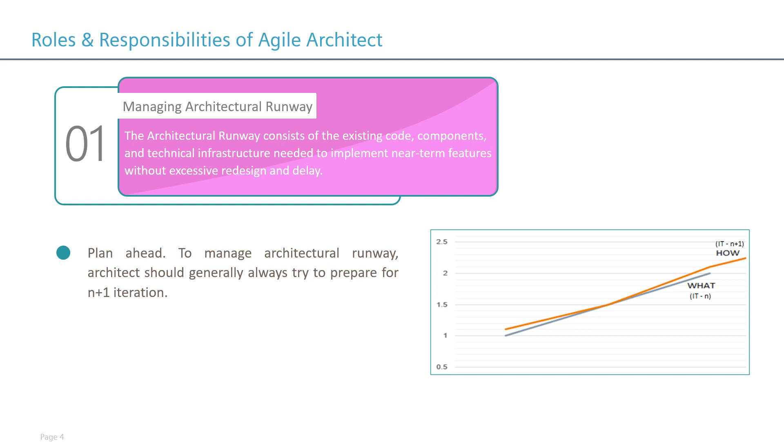Now, it can actually impact the next iteration. So this is where the expertise of an architect is required. Architects should build the architectural runway before the iteration begins.